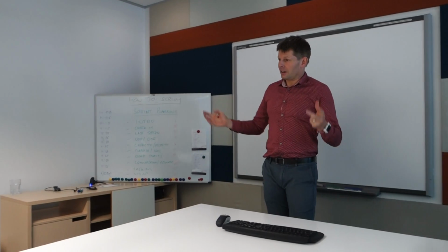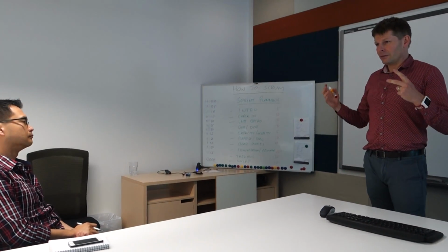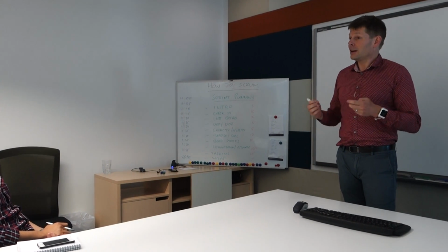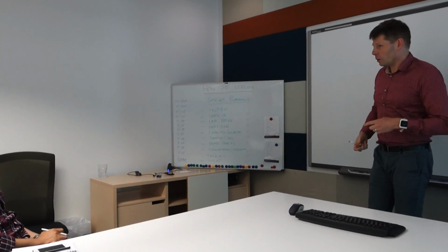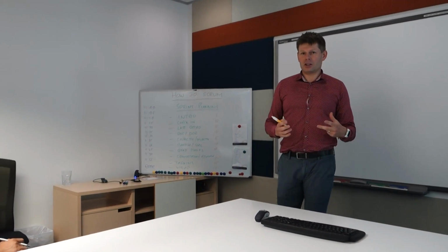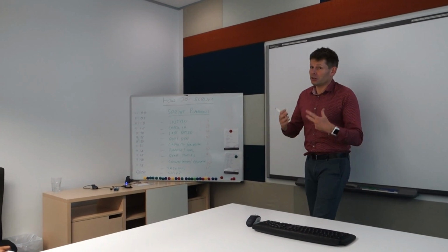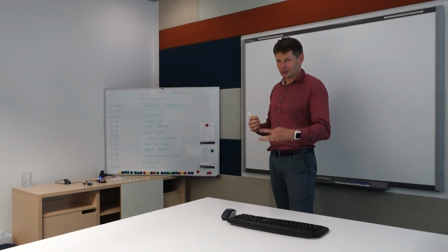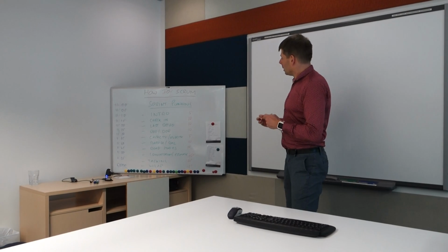At the end of that, we'll create a sprint goal, and that's what will inform us in our daily Scrum, the 24-hour planning session. And after we've done that, we're going to then task the stories out to what we know at the moment. We know that's going to change, and we know that the process of planning is invaluable, but the plan itself is useless. Things will change, we live in a complex world.